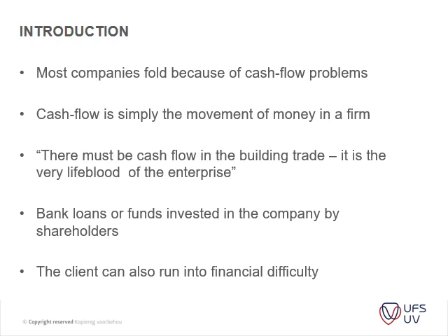So it's always worthwhile to make sure that the contract that you've been appointed for, that the client actually has the necessary funds available to pay you in the end, and pay you timeously. That's the main thing. Sometimes the client doesn't have money, and then they only pay you after 90 or 120 days, which will have an extra effect on your cash flow.